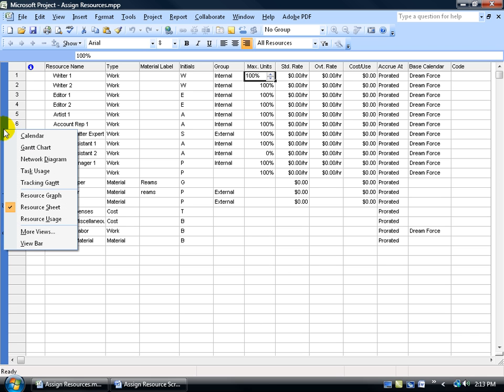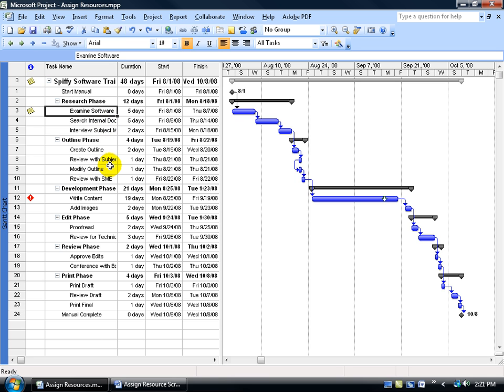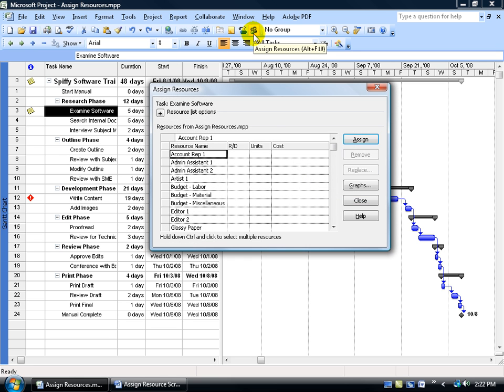I'm going to right-click on the collapse view bar and go to the Gantt chart. Now when it comes to assigning resources to your task, it's really easy. All you have to do is select your task, come up here on the standard toolbar, and click on the button that looks like two dudes. You can see when I hover over it, it says Assign Resources and gives you Alt F10 for the shortcut. Click on it, and it opens up and lists all our resources.